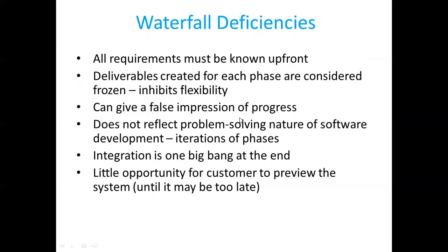Another thing is that we cannot say how much it is completed. Let's say you are doing the design document. It's not so easy to say how much is completed and how much is pending, so you'll be giving some false progress statement. It does not reflect the problem solving nature of software development, iterations of phases.